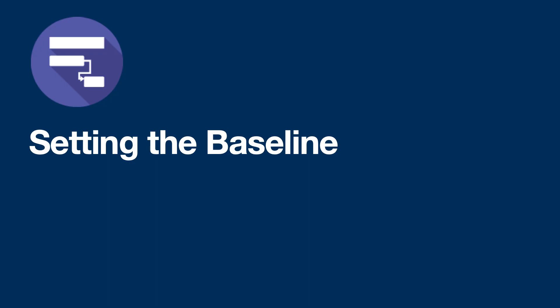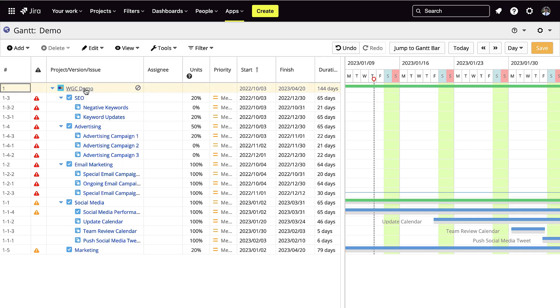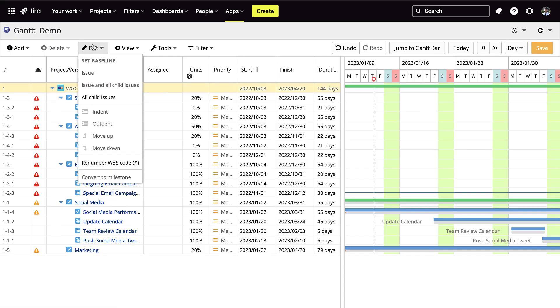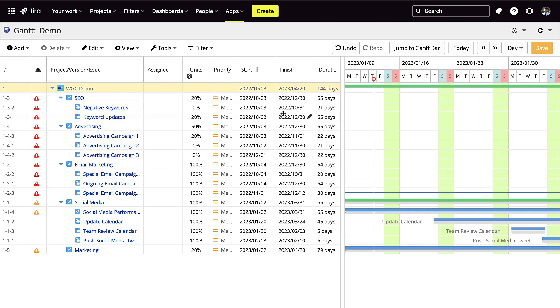Creating dependencies allows you to see your critical paths, which show you which tasks need to be completed first. To set the baseline for your project, press on edit, then go into all child issues.